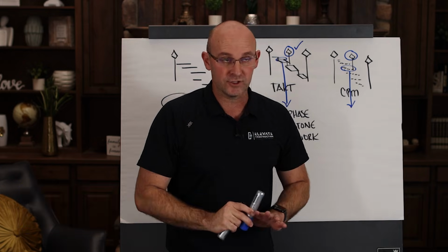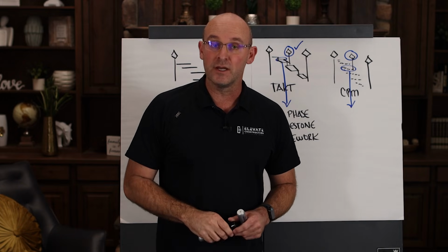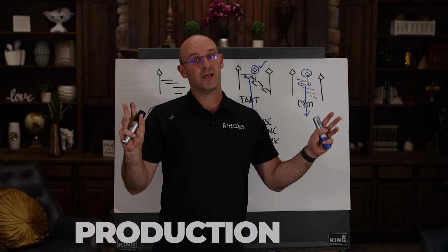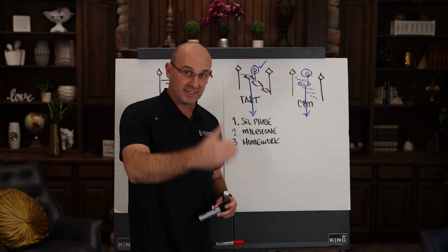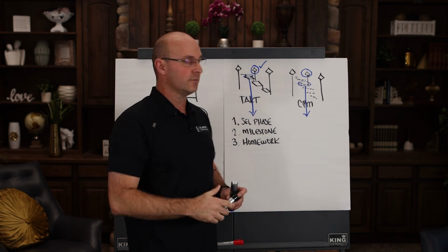And if the duration is just way different, then you can start to coordinate with that trade on getting production data before the pull plan. That way you don't have any surprises. That is my preferred way of doing it. And then you can dig into the data, you can talk to that company, you can have that ready before the pull plan.